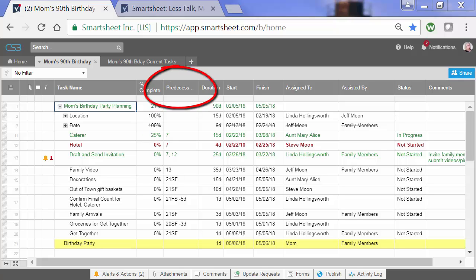It also has a predecessor column, which means you set it to follow another task. It has a percent complete that helps you to track not only the individual item, but the overall percent of completion of your project. Some of the conditional formatting available is what makes the lines through the completed tasks and highlights some of the tasks that are currently being worked on.